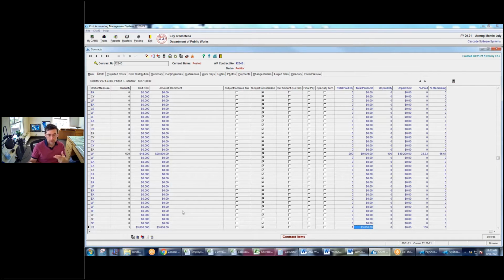It wouldn't keep growing because you delayed the project. So you'd say, okay, the project's not going to start for 2 years, we think there's going to be 6% inflation, and then you would put in that amount. If we wanted to tackle that feature, we'd want an inflation update, or an inflation posting, where you say I'm going to bump up the unit cost of every line item by 2%, and we could bump them all up.